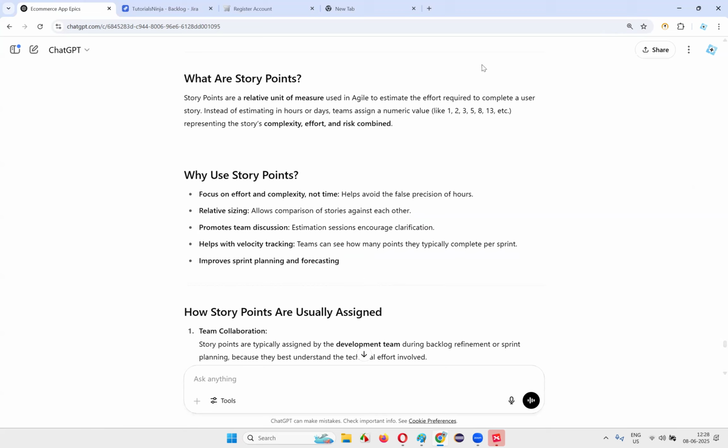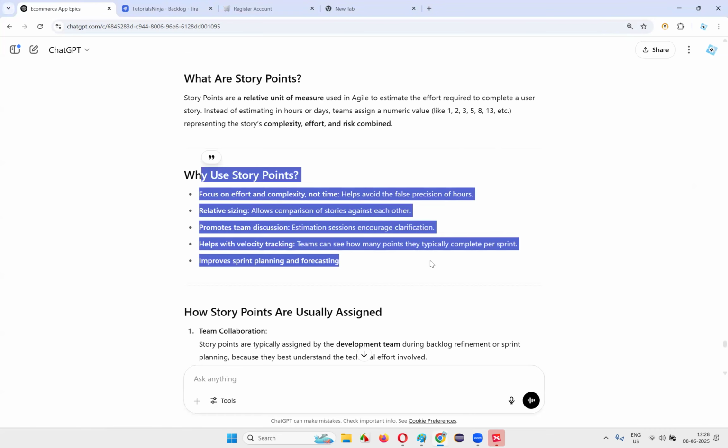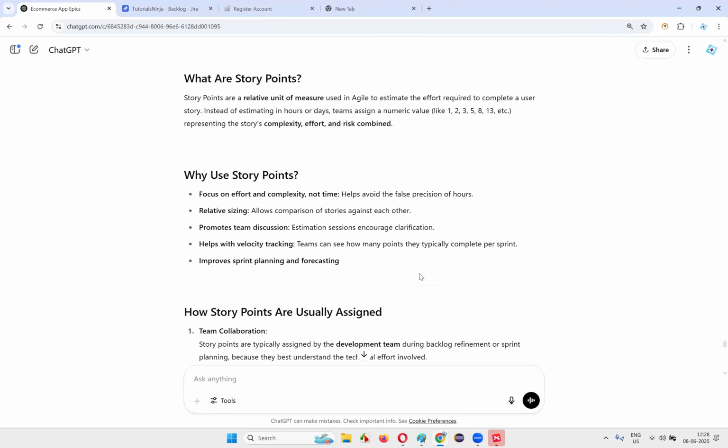I don't know whether there is a correct notation or not, Rajkumar, but in whatever projects I worked on, first the product owner will give the estimations. Story points will be given by the product owner first. Later, during the sprint planning meeting, the team will come and also give their estimates, do their own estimates, and the discussions will happen. Clear, Rajkumar?